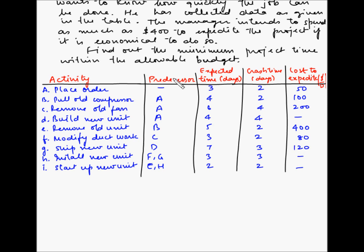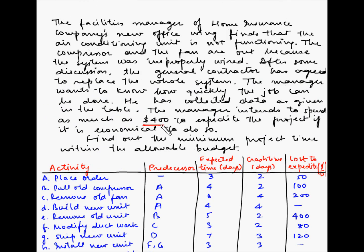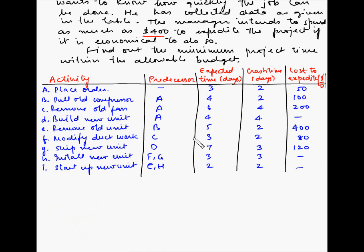Overall, the manager wants to spend a maximum of $400 and get the maximum reduction in project time after crashing. We need to find out which activities can be crashed and how much within an expense of $400. To identify the activities that can be crashed, we first have to find the critical path, and to find the critical path we have to draw a network diagram. So let us first draw the network diagram and then find the critical path.